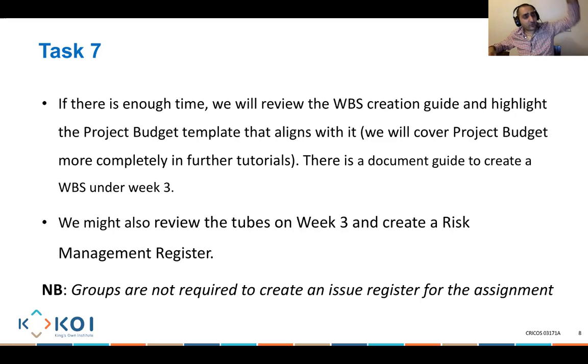So you see how I moved from level 1 to level 1.1 to level 1.1.1, and then in 1.1.1 I need to go into more details. So if I say pass the quiz, I need to do activities. What are they? Attend lecture 1, take notes, revise. Attend lecture 2, take notes, revise, sit the quiz. 7 activities.